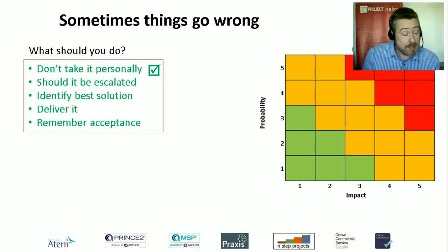Should you escalate this issue? Now, you will have been given, and we talked earlier about our planning and risk and issue management and specification, that we're going to set up some sort of tolerances. You'll be told by the customer, the sponsor, how much control you have over the budget and timescale of the project, and perhaps this issue is so significant it's going to push those things out.